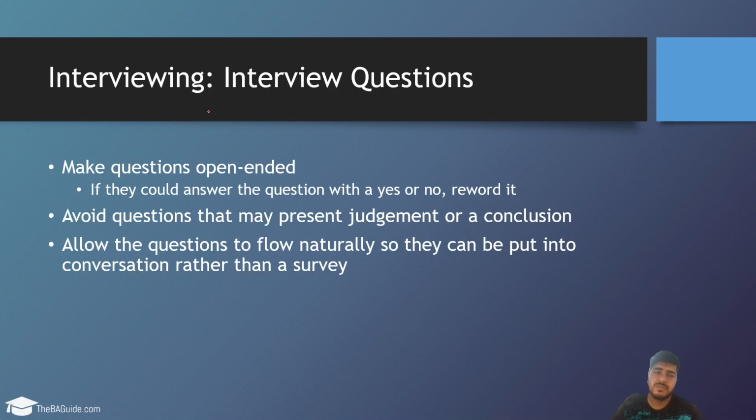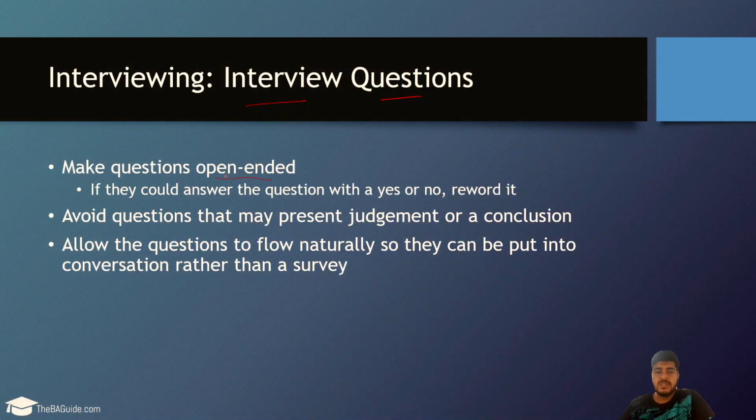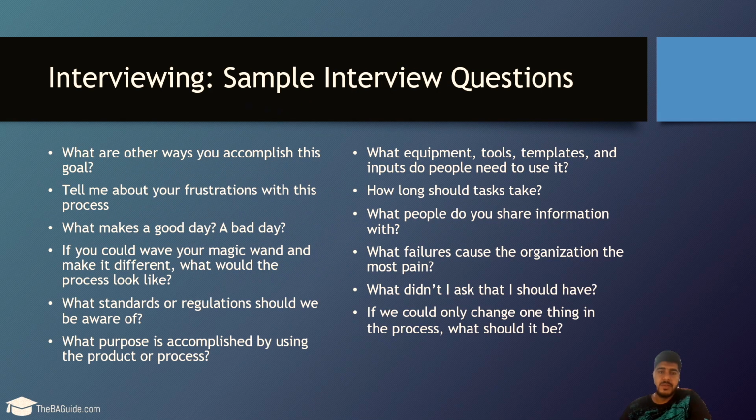There are some questions you have to prepare before going to the interview. You have to make sure the questions are open-ended and not just yes or no questions. You have to make sure they are talking and explaining the application very well, so you understand it properly and the requirements can be written. Some sample questions: What are the other ways you accomplish this goal?